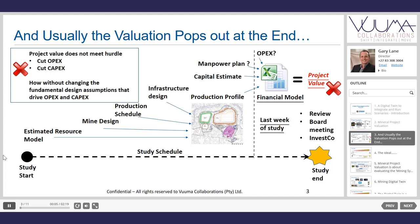In a typical study, once the project team is assembled, all these different silos of work get done. You have a resource model as input into a mine design, which takes quite a long time and is generally on the critical path. You then do the production schedule, infrastructure design, and a capital estimate to a fairly good level depending on the study phase. There should be a manpower plan and ideally a proper activity-based costing model that accounts for all actual activity costs — not just an assumption for OPEX, as was common in the past.